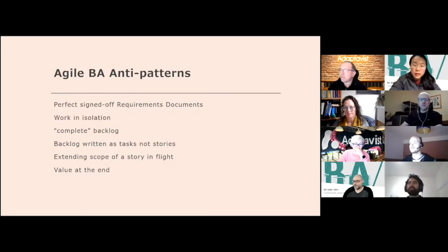If it's something which is going to require rework or refactoring, don't be scared of pulling the item out of the current sprint and reconsidering what it is you're actually trying to deliver. Be agile. Only do what you know and what is right in that respect. If it can be done and it has no impact upon the sprint, stick it in the current sprint. If it's going to have an impact, get it on the backlog and assess it against all the other requirements outside.